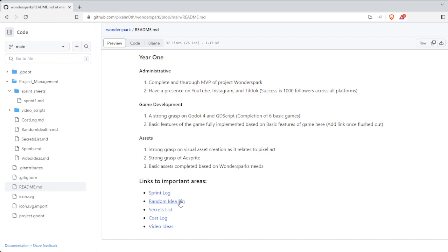Well, now you need to develop map generation, some kind of AI thing with a seeder to develop these randomized maps. But then you also need to build this new combat method. So now you have this massive scope creep. This game went from, oh, it might be done in 2 years, to, all of a sudden, it might be done in 5 years now. We might have just restarted from the beginning.